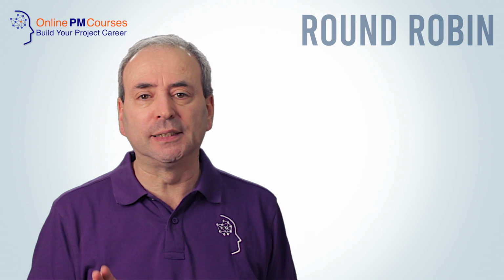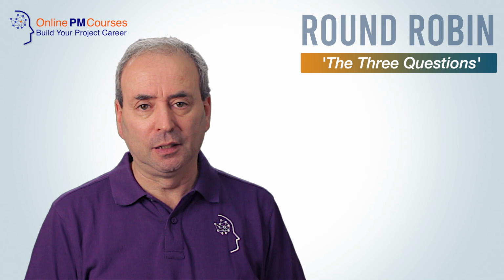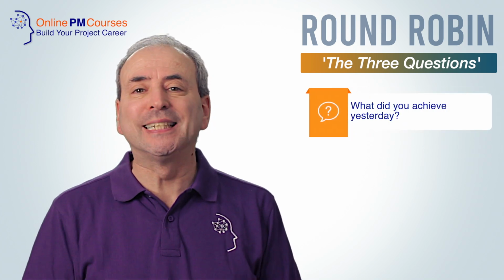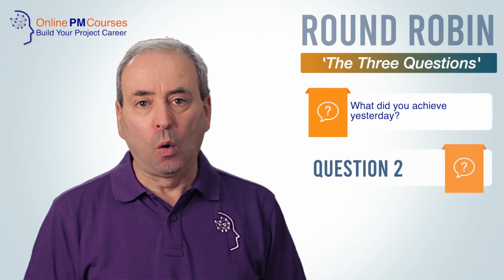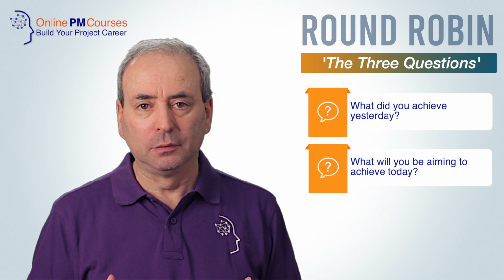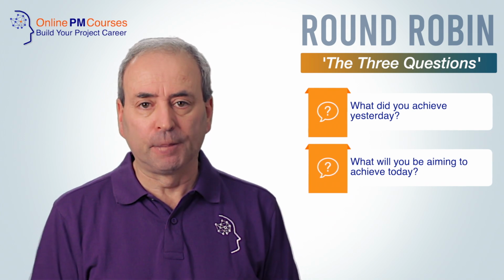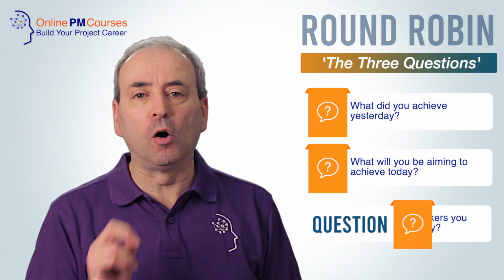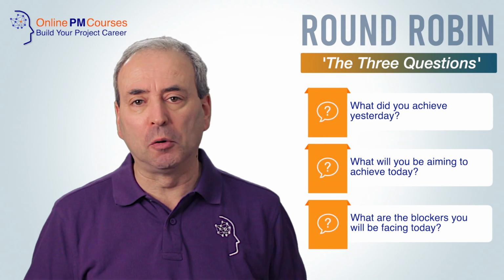And the commonest set of questions, often referred to as the 3 questions, are these. Question 1, what did you achieve yesterday? Second, what will you be working on? What will you be aiming to achieve today? And third, what are the blockers that you'll be facing today? The impediments to your progress.